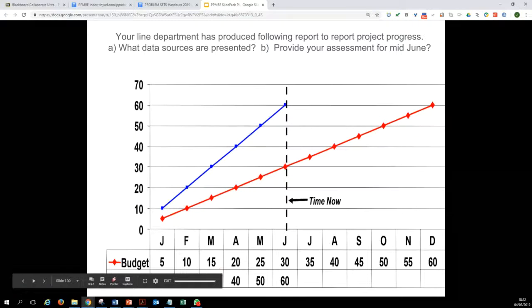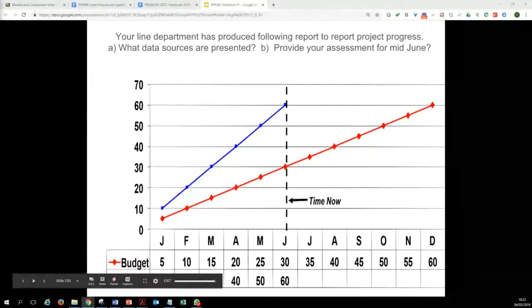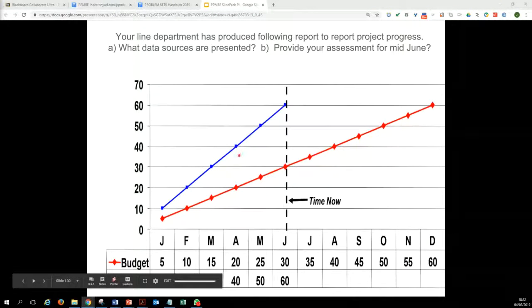We call it BCWS, which stands for budgeted cost of work scheduled, or sometimes in British literature we call it planned value as well. Basically, it serves as an anchor point, and it is telling us how much we should be spending. And what is the name of this blue line, which is telling us how much we are actually spending?